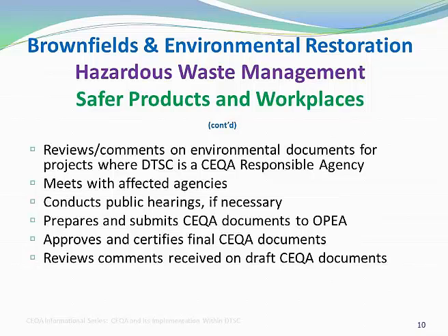Meets with affected agencies to obtain information needed for CEQA documents, for example, the Department of Fish and Wildlife, local air district, and others. Conducts public hearings, prepares and submits CEQA documents to OPIA for review. Program staff also approves, certifies, and submits the final CEQA document, usually a notice of determination or a notice of exemption, to our office for filing with the state clearinghouse.